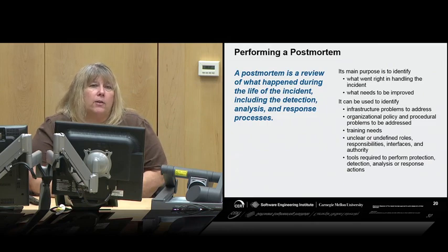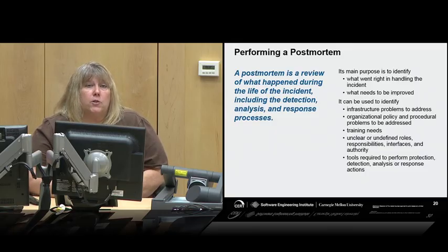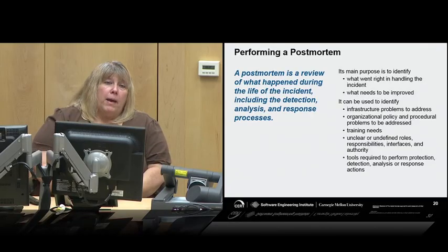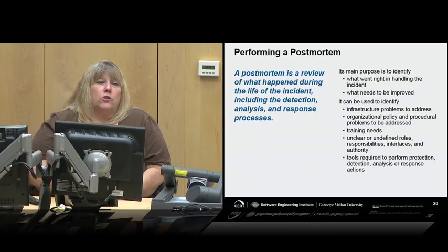Then collecting those lessons learned and actually tracking those lessons learned can be important. If over time you see the same problem occurring when you do your postmortem, then again, that should be referred to that problem management group, or that might be upper management, to say that there's a larger systemic issue here that needs to be addressed.